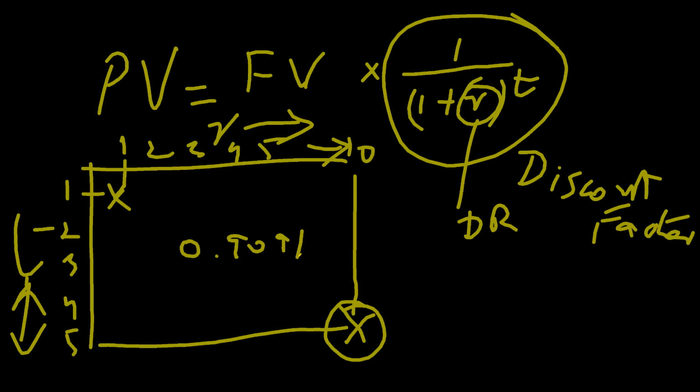So what I need to do, I simply have to multiply the relevant figure with my future value, and that will give me the answer. So I don't even have to use the formula. I can use a matrix which could be ready-made, and I can simply pick a value and multiply my future value with it and get the present value.